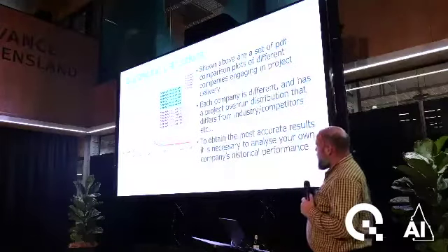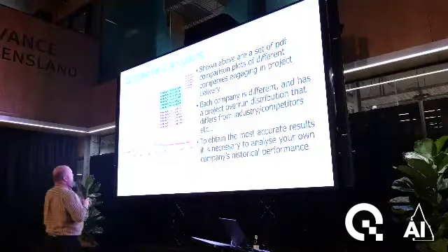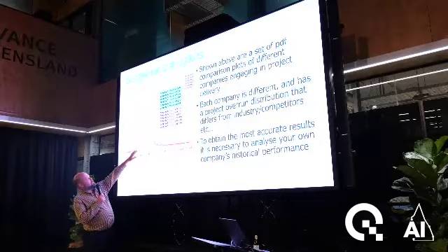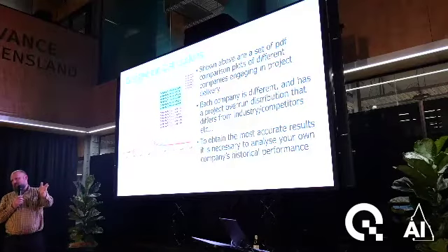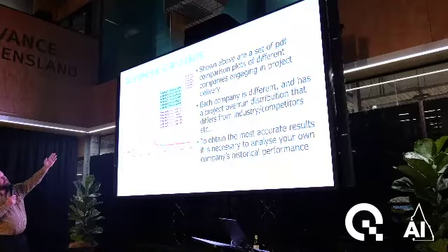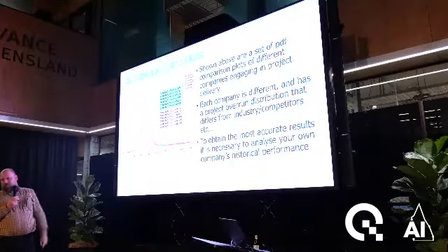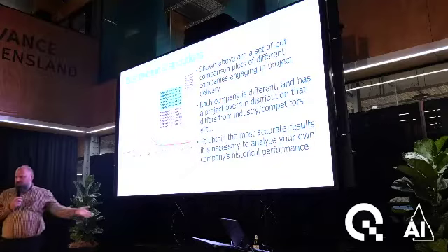So here's an example. You can see here, I'll walk around a little bit. What I've shown is a set of companies that we've had to deal with, and I've shown the reference class forecast at the very beginning, the first month of the project starting, and you can see how different they all are. Also what I've done is I've shown what the median overrun is. So they're all above 1, and in most cases they're between a 70 or 80% chance of overrunning, going more than what the original forecast was. But there's even some, like this company D, where there's a 90% chance of overrunning.